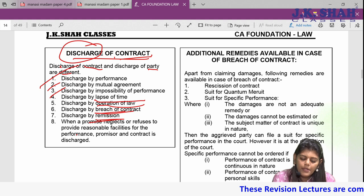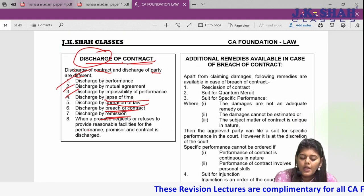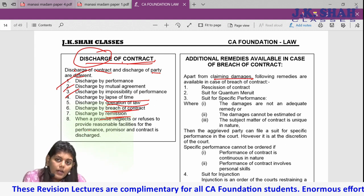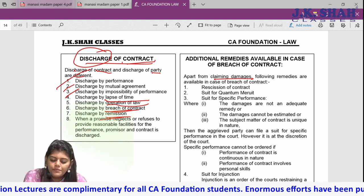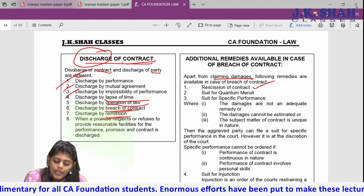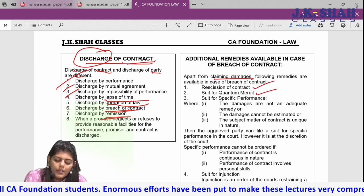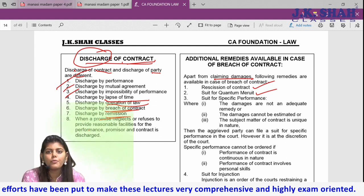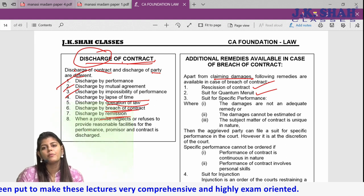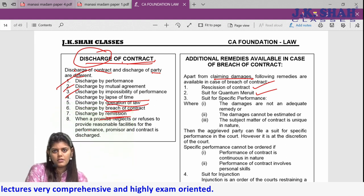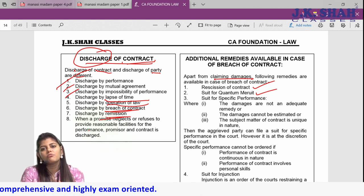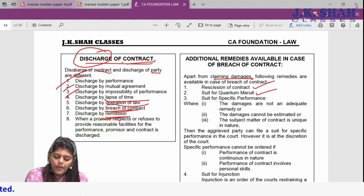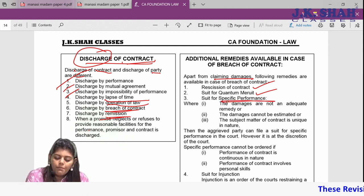Additional remedies available in case of breach of contract: apart from claiming damages, the aggrieved party can rescind the contract, file a suit for quantum meruit, or claim back any advance paid. For example, if you were supposed to deliver goods worth 1 lakh and the buyer paid 10,000 advance, and you breach, the buyer can claim the 10,000 back under the principle of quantum meruit.